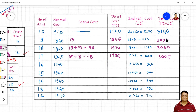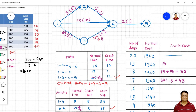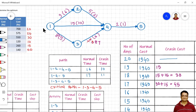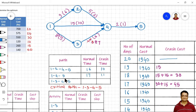After crashing 3-4 to 7 days, we re-evaluate the critical path. Path 1-2-4-5 remains 16 days, path 1-4-5 remains 17 days, and path 1-3-4-5 now has duration 8+7+2 = 17 days. So now we have two critical paths: 1-4-5 and 1-3-4-5, both at 17 days. To reduce the project duration, we must crash activities on both critical paths simultaneously.